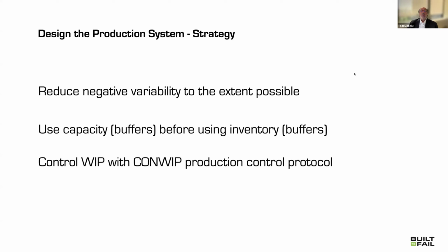So let me translate that. We wanted people and equipment waiting, not material. Wow. People and equipment waiting, not material. Now, when you only have 1 day of laydown on site, it's pretty simple to do that, right? But when you're dealing with people that come out of the car industry, and the guy that ended up taking over the project after a while, Tony Douglas, he was John Egan's car man, right? They got this, right? So there's a trade-off between capacity, labor, equipment, space, and inventory. And again, it was capacity, people and equipment waiting over materials waiting, right? That was one of the key things that happened here that contributed to the success.